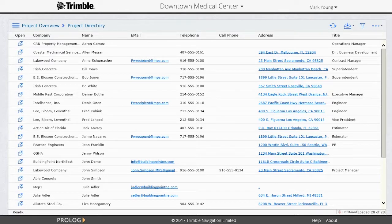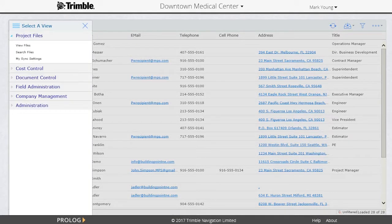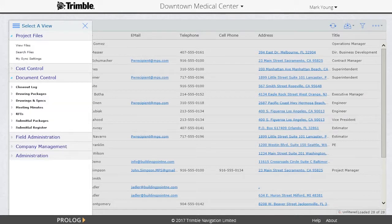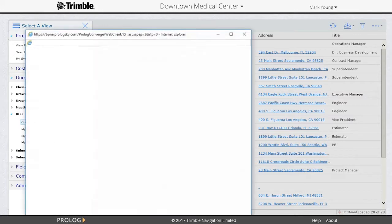Prolog makes it easy for subcontractors to log in and create their own RFIs. Once logged into Prolog, a sub can navigate through the Select a View button to the module called Document Control, and then into the area called RFI where they'll find the Create button. After clicking on Create, a new window will appear.